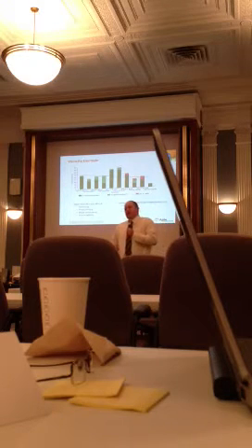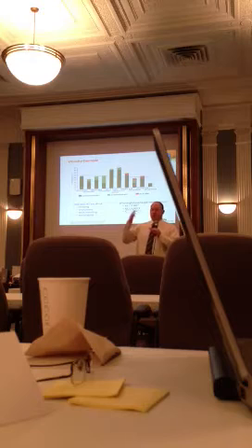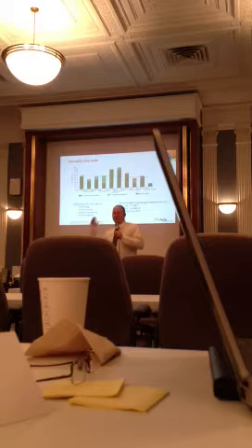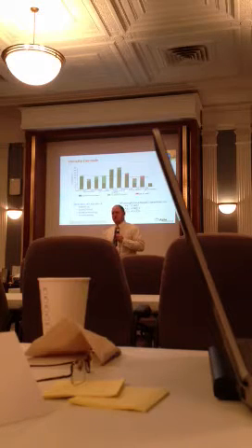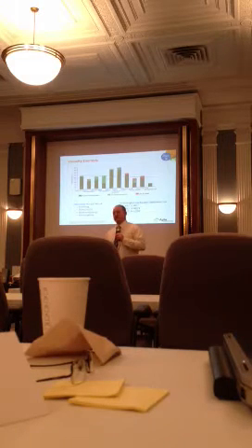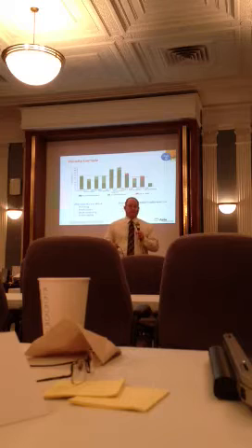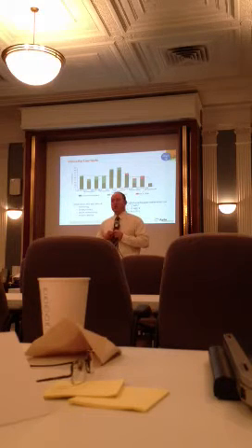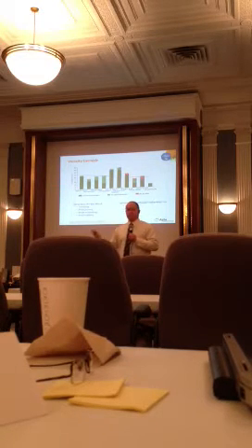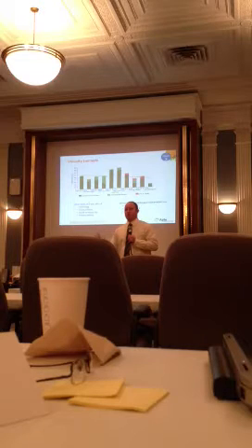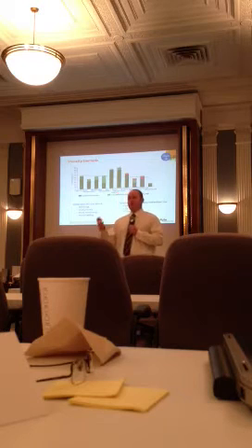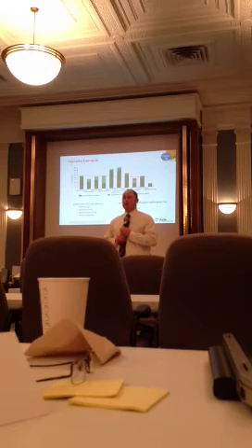Because the reason it's not as big an impact in a waterfall world is because you're under this assumption that you have so long to do something that, well, if somebody goes on vacation, we just won't work for those 2 weeks, right? We're under the assumption we still have to do it even when they're on vacation, because that's how it works, right? And in my experience, this is the part that makes me nervous, with the way we're set up with SMEs, and this is particularly bad in the enterprise space. There's one person that knows that, there's one SME, then there's other people that maybe slightly know it, right? And then somebody goes on vacation, and honestly, work can't get done until that person gets back.